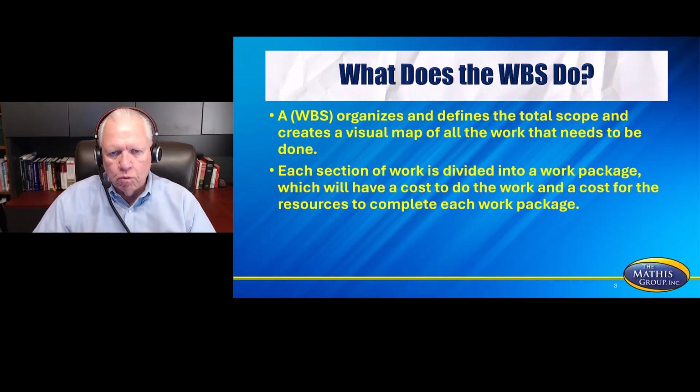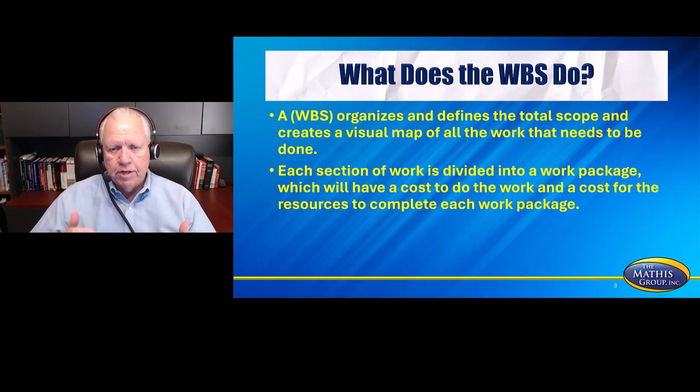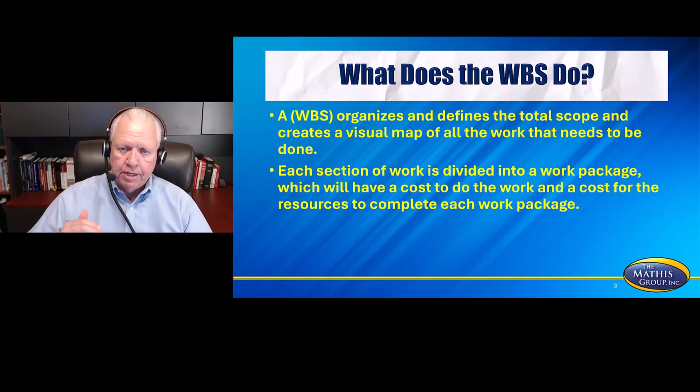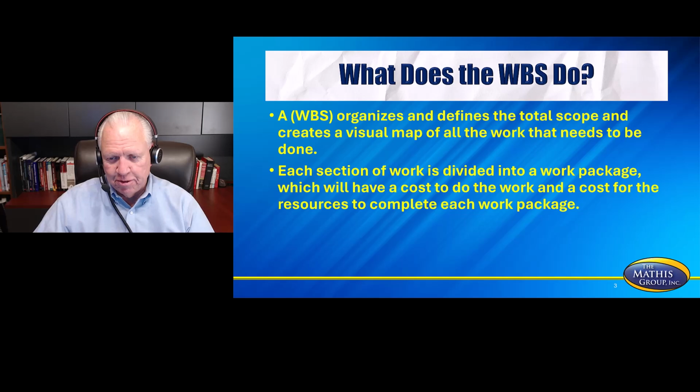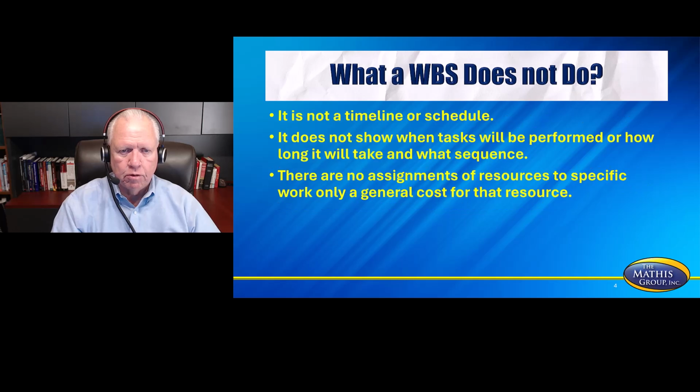So when they talk about a work package, here's what they're talking about. It's the lowest level of the WBS, and that's a test question topic as well. So what's the lowest level of the WBS? It's going to be a work package. Now, it's not the lowest level in a project. I can take my work packages and break them down into activities, and that's the world that we live in most of the time, in that activity world. But the lowest level of the WBS is going to be the work package level.